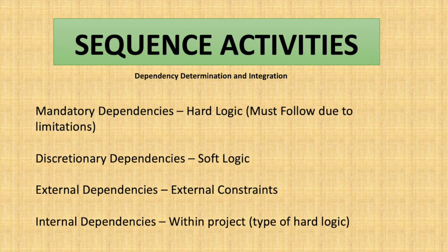We cannot start our installation process until our procurement is completed. We have to have that material before we start installation. This type of logic, this type of dependency, is called mandatory dependency. We have limitations that we have to follow.